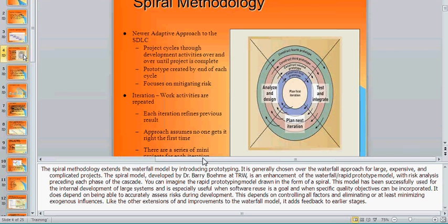Once you've gone through 4 phases, then you will get your customer feedback. Your goals and objectives for release 2 must include the customer feedback provided from release 1. That will define your new scope. Based on that new scope, you will estimate your time and budget, and will go on to do a second set of waterfall. Is it clear?